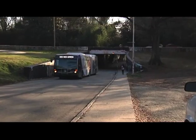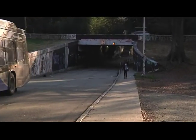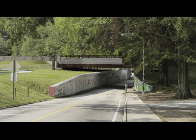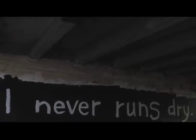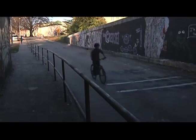So Dennis, how will the new bridge look as compared to the existing bridge that we have now? The existing bridge is a 30-foot long, 60-foot wide structure. The replacement structure will be 80 feet long, 60 feet wide. And the abutment walls, the free expression walls, if you will, that line Campus Drive will be reduced in height. The elevation will be cut down a little bit because the new structure is a little deeper than the existing structure.